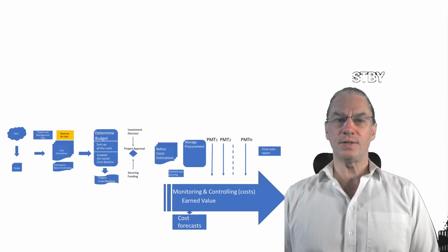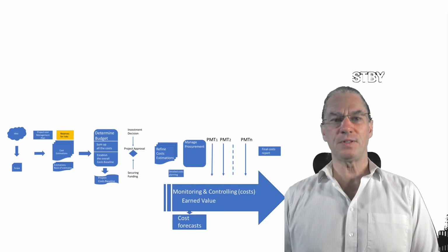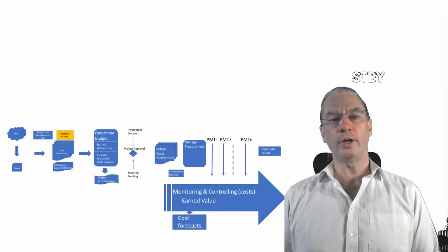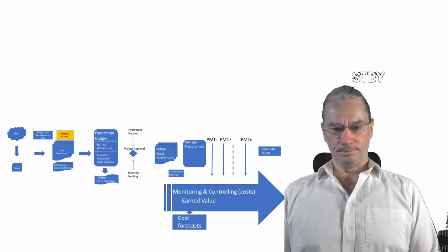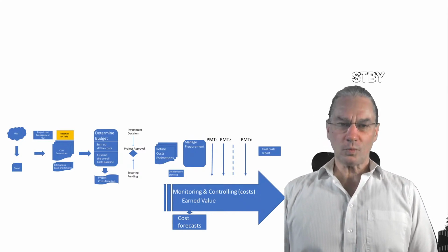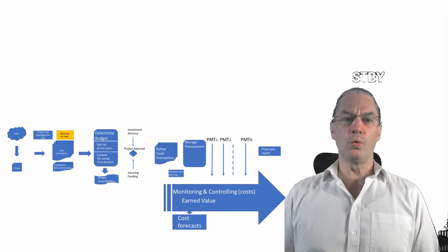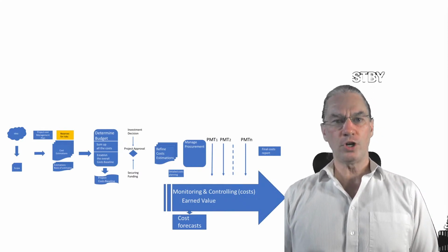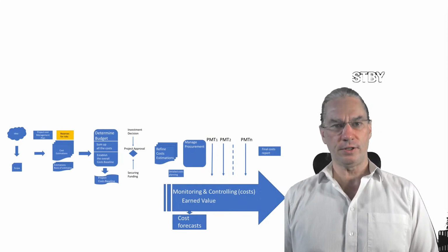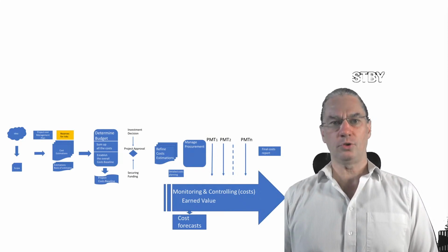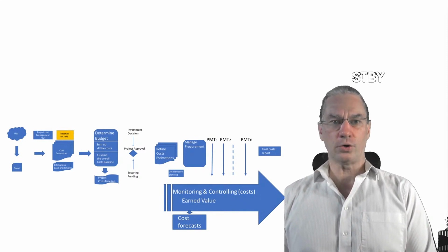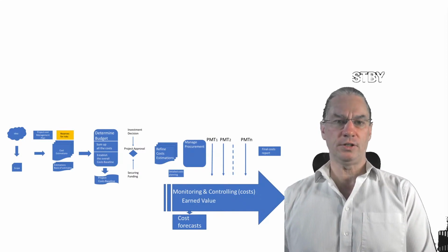One important point that we seldom see as project managers is the securing of the funding. Once a project is approved, we won't get an amount equivalent to the project immediately at the start. This will come gradually, following steps according to the amounts that are needed.